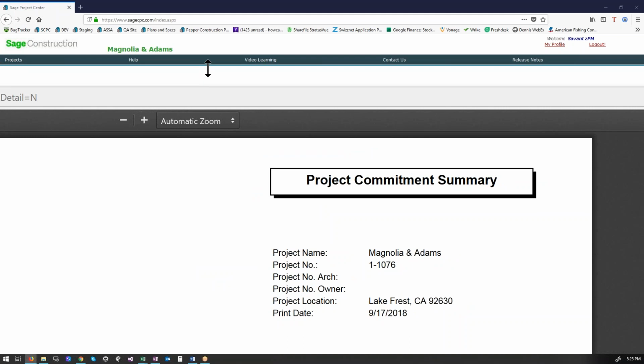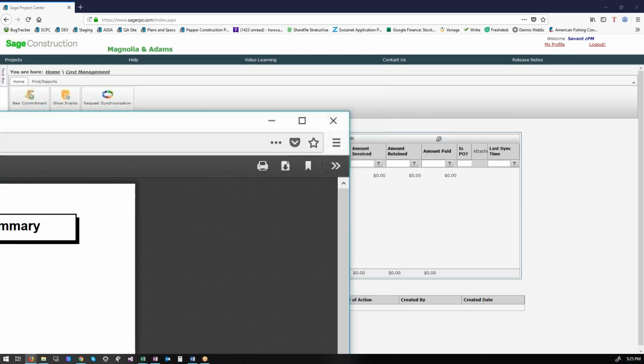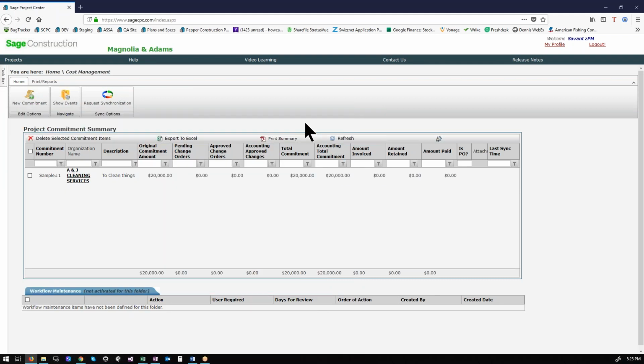Is that considered with the report? Is that the report that the committed contract? That's the summary. It doesn't show the breakout, but it'll show, for now, contract and then pending and approved, right? If I remember correctly. For the detail, yes, it will show the pending and approved change, only in the change order status. So CORs and PCOs, it won't show. Only ones that are in the change order status, so pending and approved. Oh, only change order status.